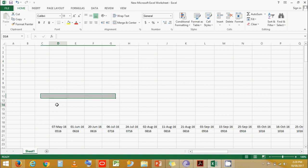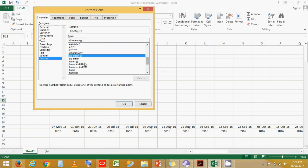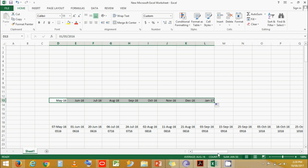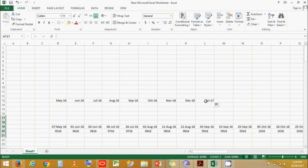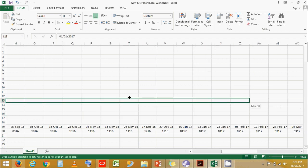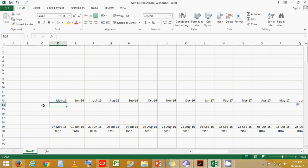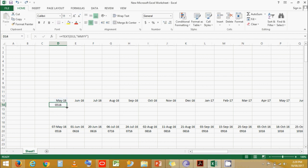Let's bring this down. Let's write the date starting from 1st June 2016, convert it and change its format to month and year. Click OK. Now let's stretch this. The last slab casting date is in September 2017, so let's stretch it till 2017. Now let's convert the months into a monthly text format: select TEXT, select the value, format as month and year, and close the bracket. Now let's stretch.